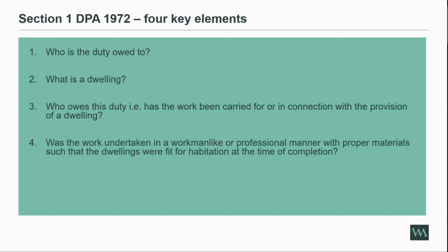A lot of the time, we'll obviously look at blocks of flats, and that's been in the news a lot recently. In relation to blocks of flats, the courts have said that a block of flats is a building that contains a number of separate dwellings. So the block of flats isn't actually a dwelling itself. It just contains a number of separate dwellings within it. And those non-living spaces, so your common parts, do not form a dwelling.